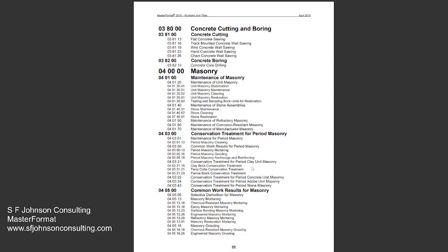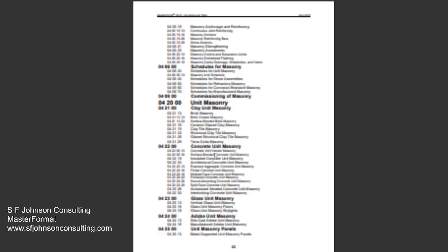And so if you are the masonry contractor, you're going to go to your division 040000. And remember, this is everything that could be done under that scope of work. And so, of course, in every project, you don't have everything. And so some of these things are going to be missing, but what is specifically related to your project will definitely be there.